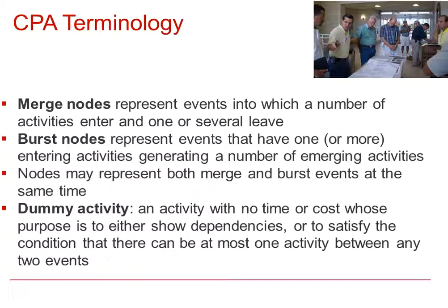Merge nodes represent events into which a number of activities enter and one or several leave. Burst nodes represent events that have one or more entering activities generating a number of emerging activities. Nodes may represent both merge and burst events at the same time.